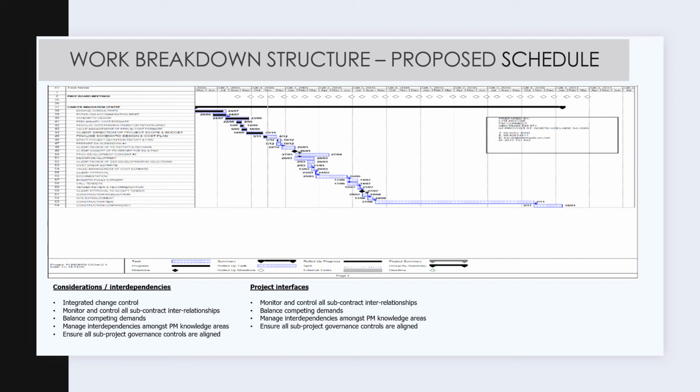Also important is understanding the total float, being the amount of time that a scheduled activity can be delayed or extended from its early start date without delaying project completion. The development of the schedule requires the following to be considered: the resource availability and whether there are opportunities for efficiencies whilst utilising the same contractor to execute works across multiple subcontracts.